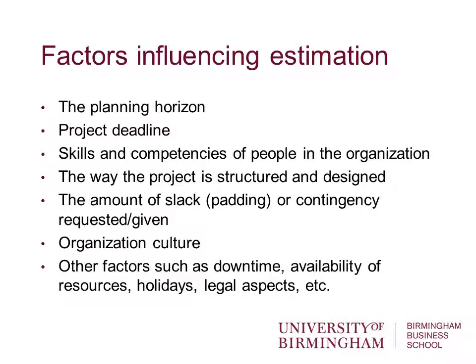are we trying to plan, what is the project deadline, when do we need to start the project in order to get it finished on time, the skills and competencies of the people involved in the organisation. Do we have project management skills? Do we have knowledge of previous projects which we can draw upon to help estimate the current project? The way the project is structured and designed, the amount of slack or padding or float sometimes called, or contingency which might be given to the project. What the culture of the project is. Is it a top-down driven culture, or is it more of an egalitarian culture?